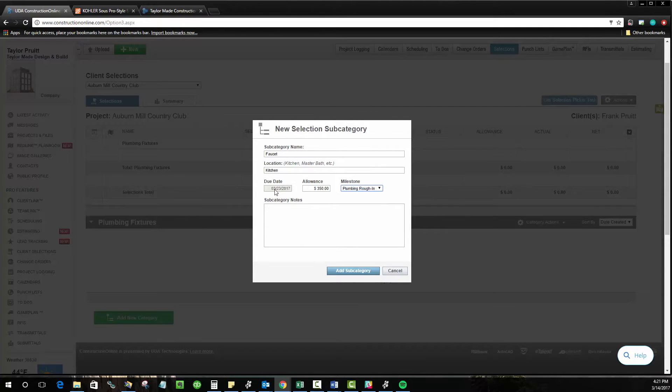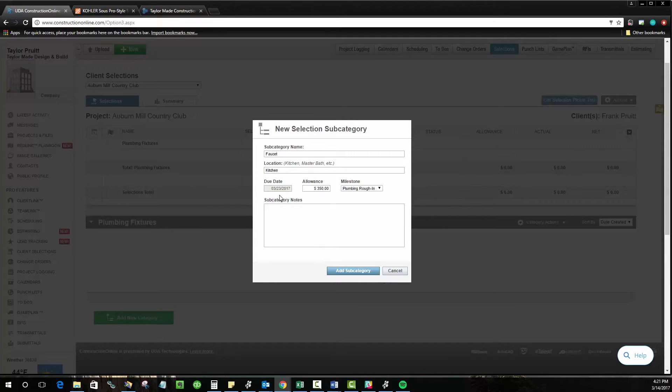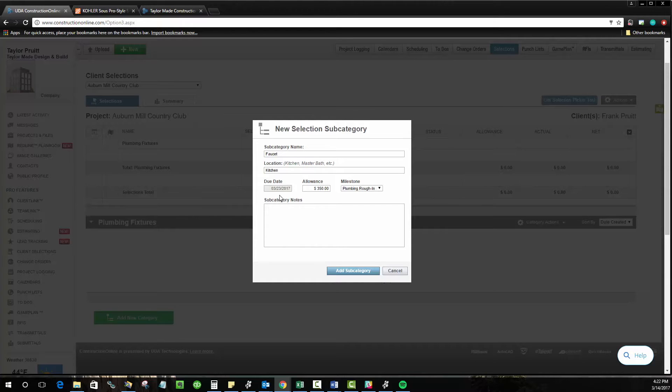And in this case, you can see that that automatically sets the due date to the 23rd, which is where this schedule has that plumbing rough-in inspection, and that date is locked in now. It will change with the schedule as the schedule is altered, but you can't change it here because it's tied to that milestone.